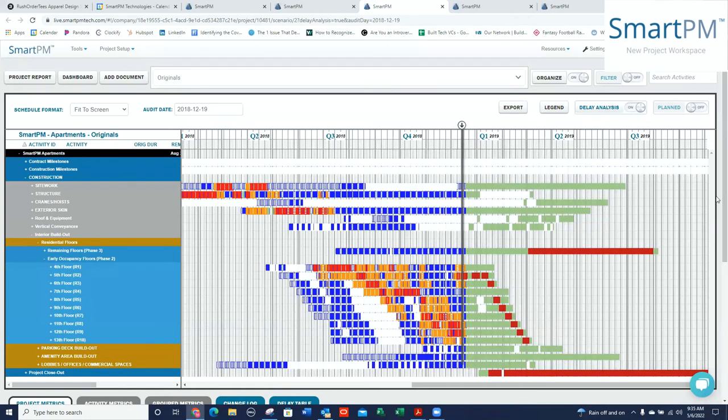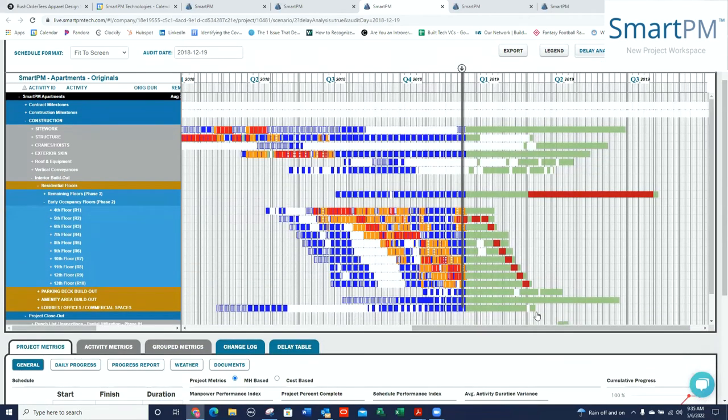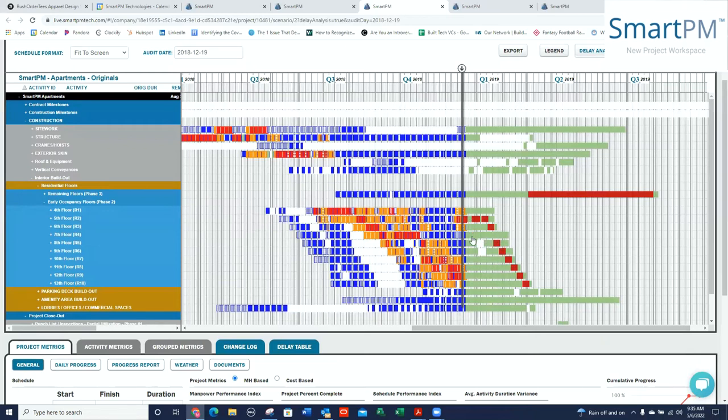And I can also see the future critical path. And I can diagnose whether or not I think that's accurate. In this case, it looks like the critical path is going through a given floor and then getting into some inspection work, I would imagine. But that's not usually the case. That usually happens when you have missing crew logic going up a building.